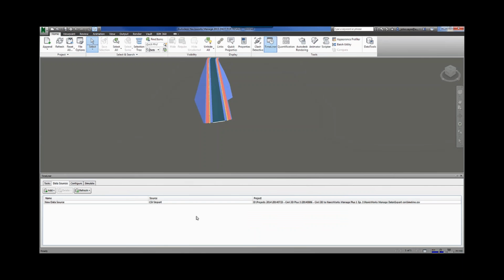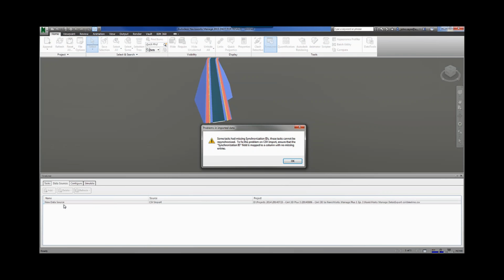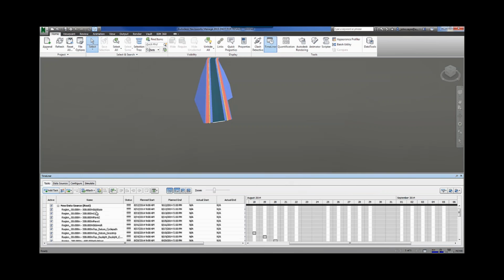So once that's added in, we can then go back and have a look in that tasks panel. Critical there to just hit that rebuild, and here we are. Here are all the different parts. You can see that there's the naming here of the regions and things like that. That's the critical part, that they're all mapped out correctly within the Excel file we're using there.